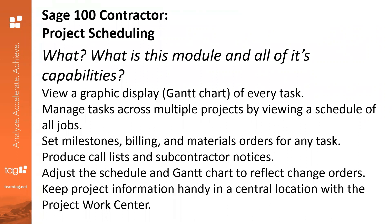If there's a delay on a project, you want to print a notice for all subcontractors that are going to be affected — that's a daunting task that can be streamlined to just a couple of clicks. You can adjust the schedule and the Gantt chart to reflect change orders. It allows you to keep all project information handy in a central location with the Project Work Center, tightly integrated with the rest of SAGE 100 Contractor. You can also easily drag and drop, move, and resize items on the Gantt chart for any schedule changes — a really nice, easy way to make adjustments quickly.